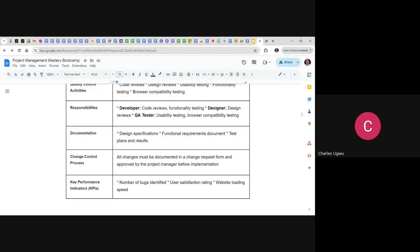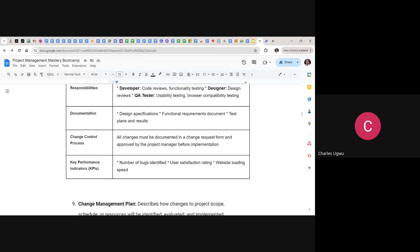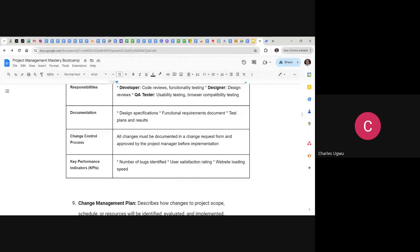These are what need to be documented before the project starts. You also need to include the change control process — all changes must be documented in a change request form and approved by the project manager before implementation. And then the KPIs — key performance indicators — include number of bugs, user satisfaction rating, and website loading speed. These are what we use to measure quality.